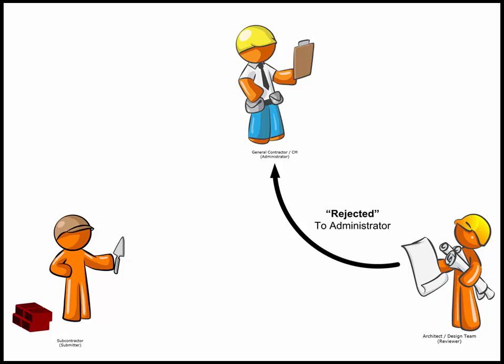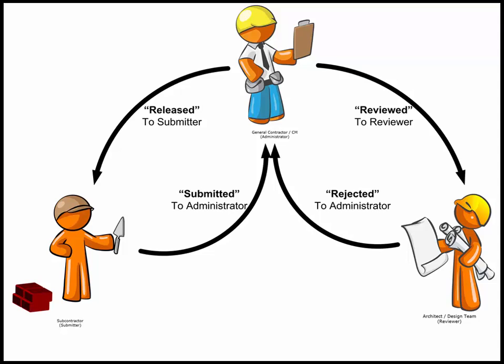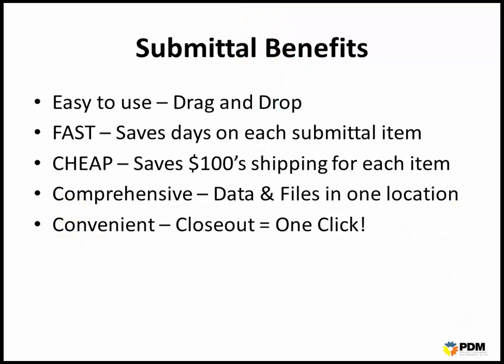The entire process may be repeated over and over again until the submitted documents have been accepted by the design team. The system tracks the entire process and assures that all users know the status of each submittal item during the entire process. Overall, the system makes the process of managing the collection and review of submittal items far easier and less expensive. The system has been used on large projects that require thousands of submittals to be processed simultaneously.